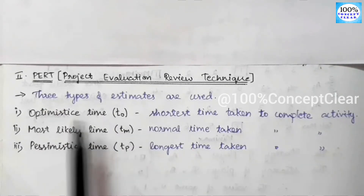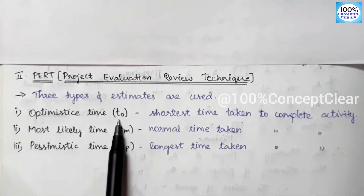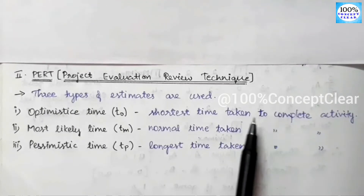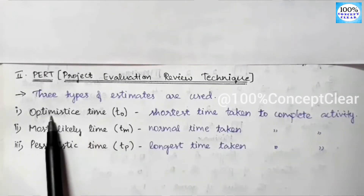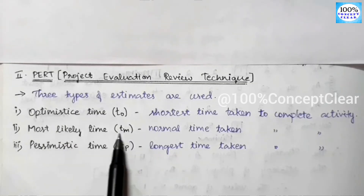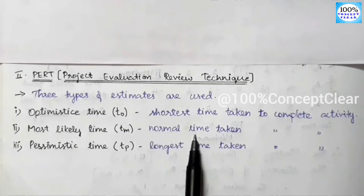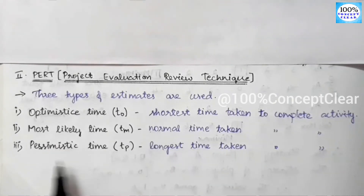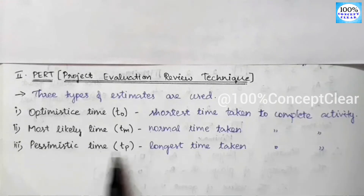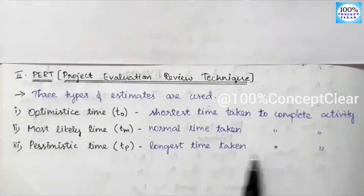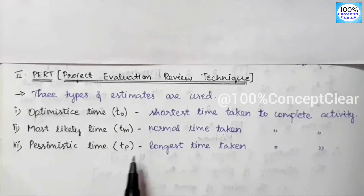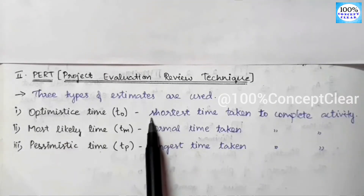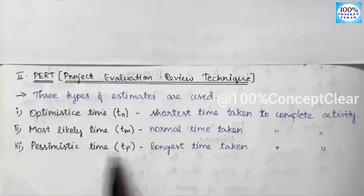The three types of time estimates in PERT are: first, Optimistic Time (TO) — the shortest time taken to complete an activity; second, Most Likely Time (TM) — the normal time taken to complete an activity; and third, Pessimistic Time (TP) — the longest time taken to complete an activity.